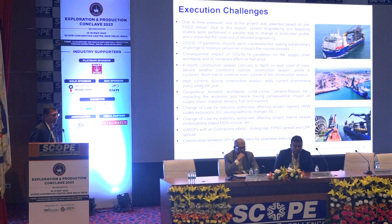It is just a 4-month construction season, January to April. Although we have worked beyond the construction season for a few months, depending on the project schedule and in terms of meeting the commitment, the construction season limitation makes it more challenging.